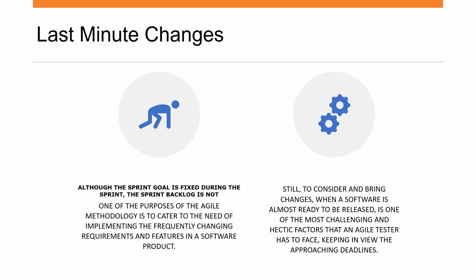And backlog goal means the requirements acceptance criteria keep on changing, which is a bad practice, honestly speaking. Once the sprint is locked and starts, you cannot change any of the acceptance criteria under any of the stories. It is the responsibility of the scrum master to make sure that no change is incorporated once the sprint starts.